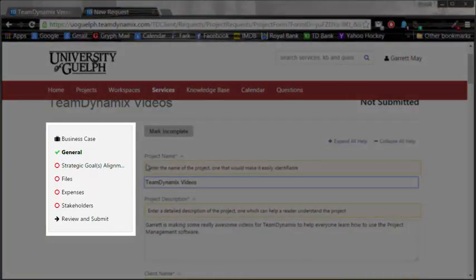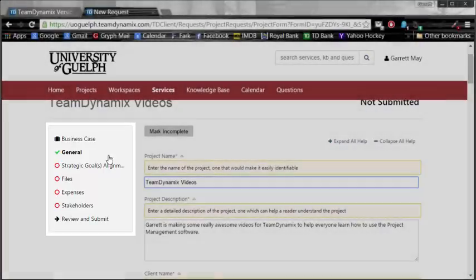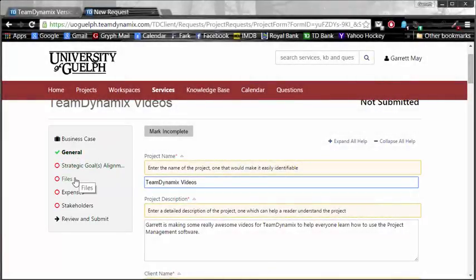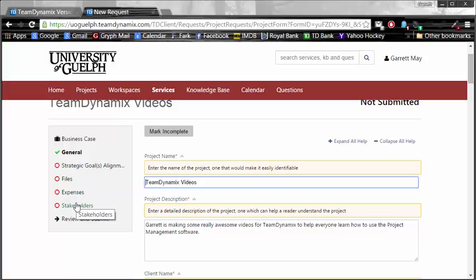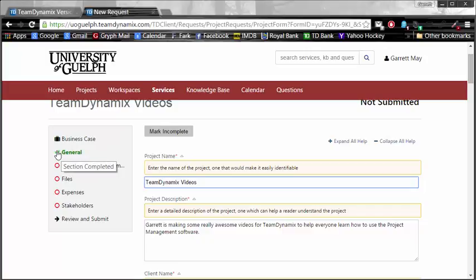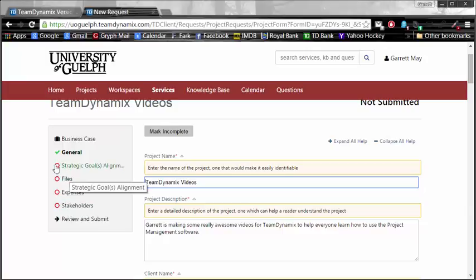We need to move on, though. We have the first one done for the general one, but we do need to complete the strategic goals and alignment, files, expenses, and stakeholders before you finally review and submit. Additionally, you can fill out these business cases in any order you choose. The general one is the first one, which is generally the best place to start. But the other four can be filled out at your own leisure, at your own time, in whichever order you see fit.